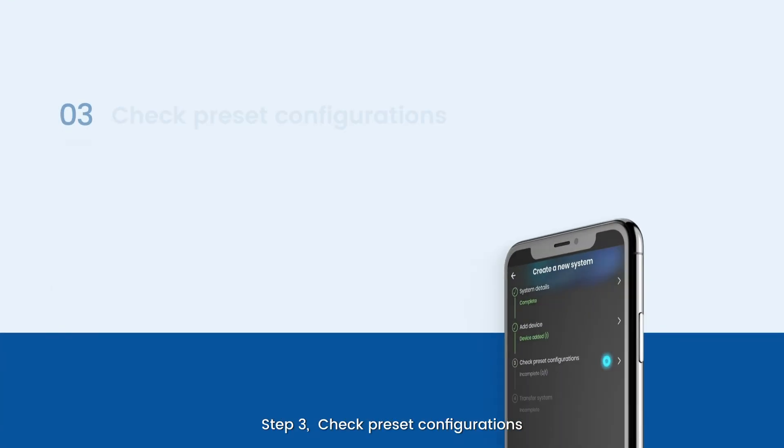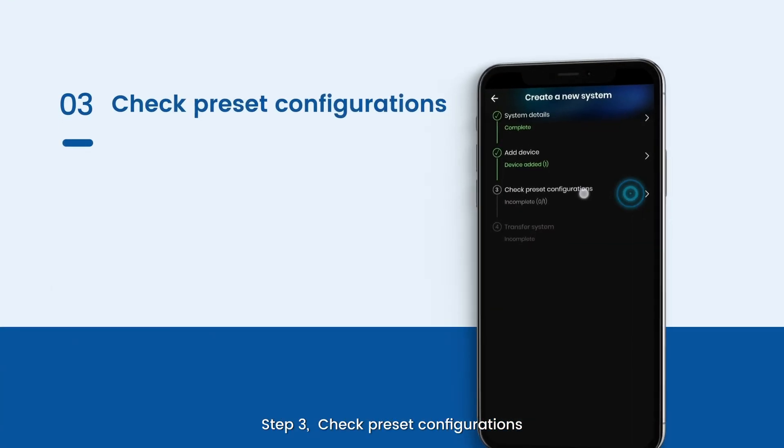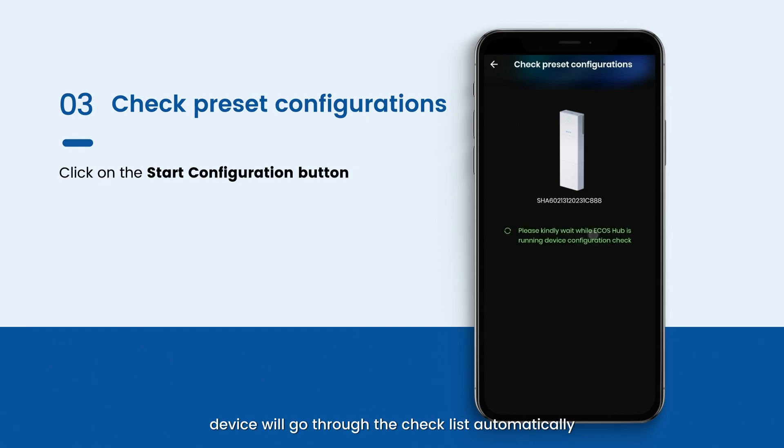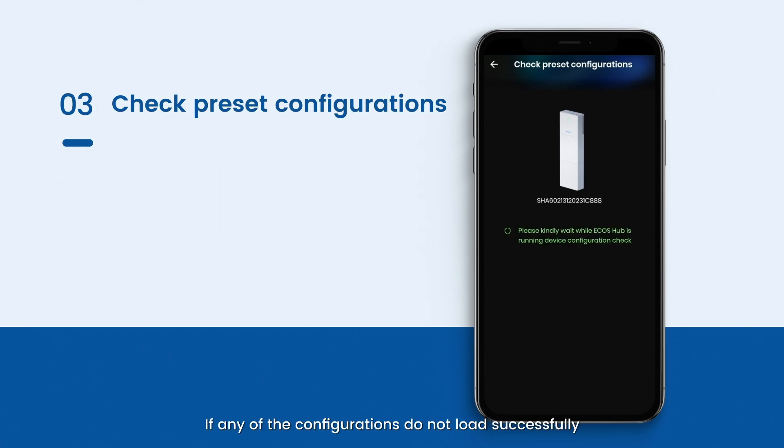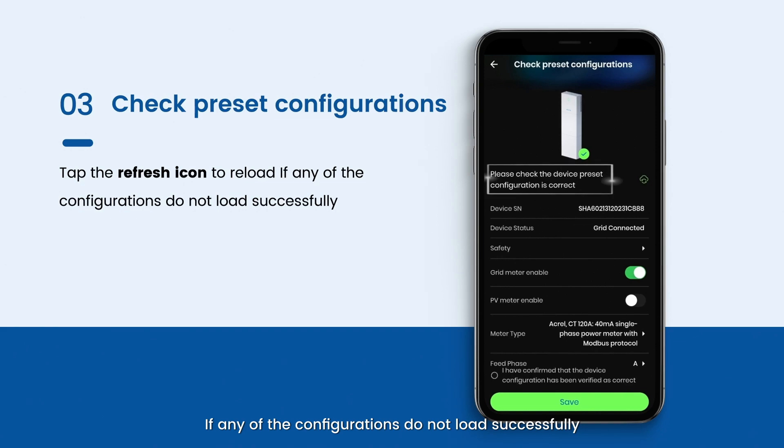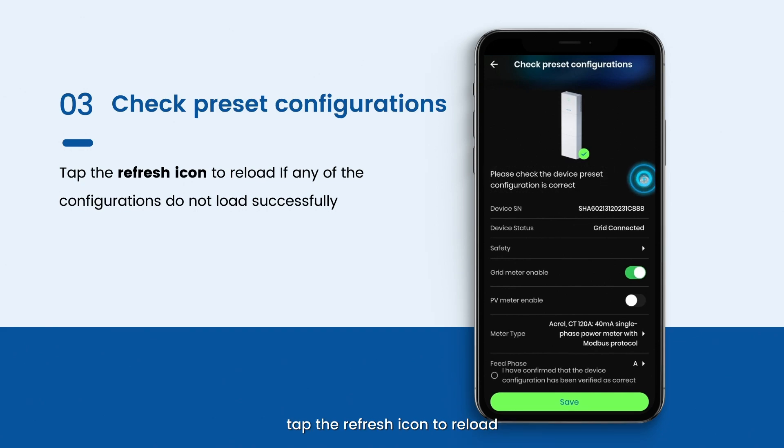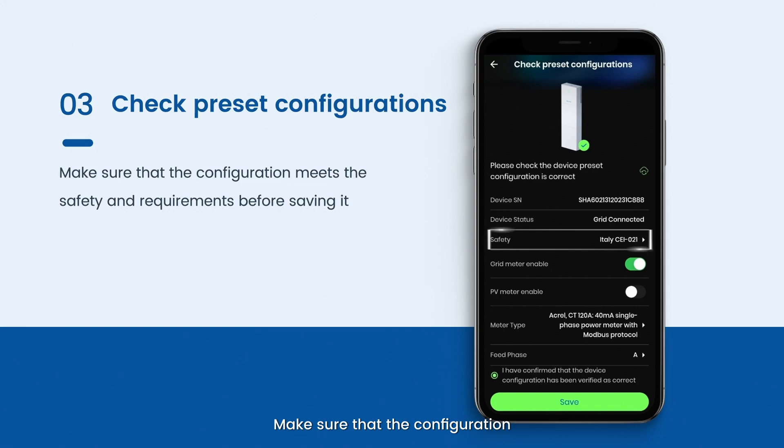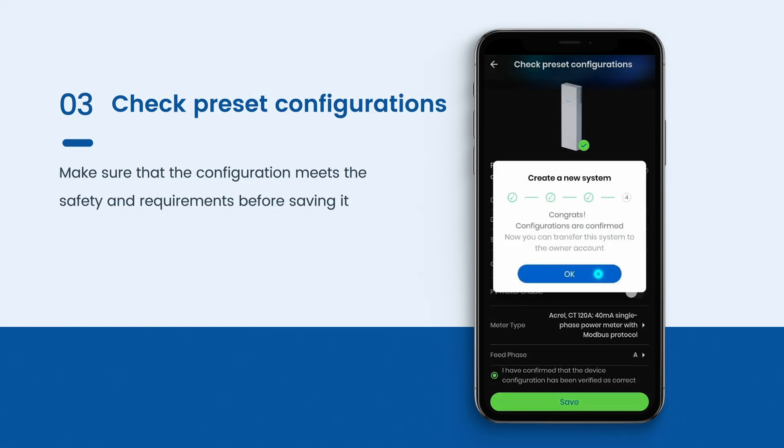Step 3. Check preset configurations. Click on the Start configuration button. The device will go through the checklist automatically. It will not take long. If any of the configurations did not load successfully, tap the refresh icon to reload. Make sure that the configuration meets the safety and requirements before saving it.